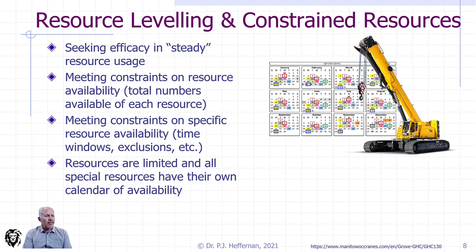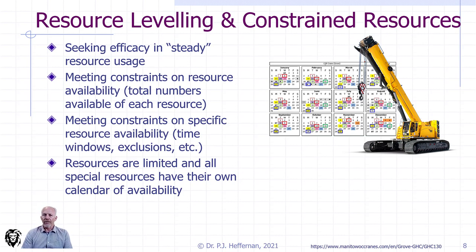Certainly select critical assets are going to have a very specific schedule — they're going to be highly sought after and you're going to have to manage that schedule. As I mentioned in the previous lecture, there are interdependencies not just within your project, but with other projects going on in your organization. So integrating with those resource schedules and resource calendars becomes really important. Fortunately, some of the software we're using these days is able to manage a corporate resource calendar and allow integration of multiple projects looking at the same resource calendars.